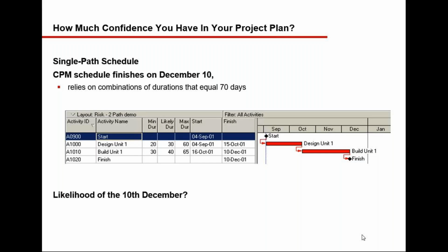Now, when we say risk management, there are six processes involved. First is plan risk management. Then identify the risk, then qualitative risk analysis, quantitative risk analysis, then plan risk responses, and then risk monitoring, right?